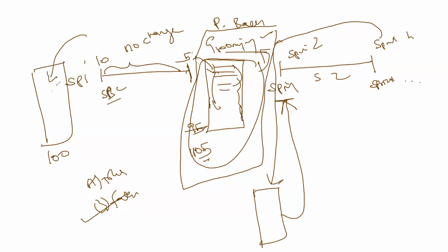Only product backlog. Customer says, no, this is high priority for me. The question is, can we do it in the next sprint, sprint 2? The answer is yes. Okay, fine. We will put it on top of the product backlog, do it in the next sprint. On the other hand, customer says, no, today is day 2 or day 3 of the current sprint. What the team is doing now is no longer important for me. What I gave you now is more important, or something else in the product backlog is more important.